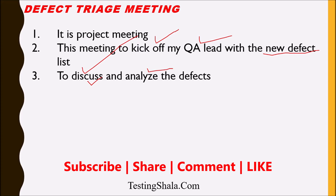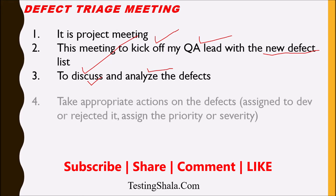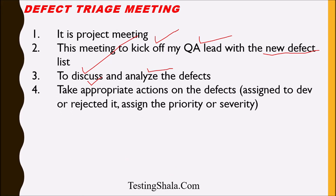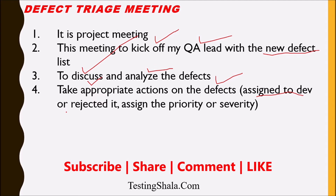After discussing each defect in the meeting, necessary actions are taken. If a defect has been accepted, it will be assigned to the development team. If it requires more information or is not a valid defect, it will be rejected. Priority and severity are also assigned to every defect based on its criticality to the business.